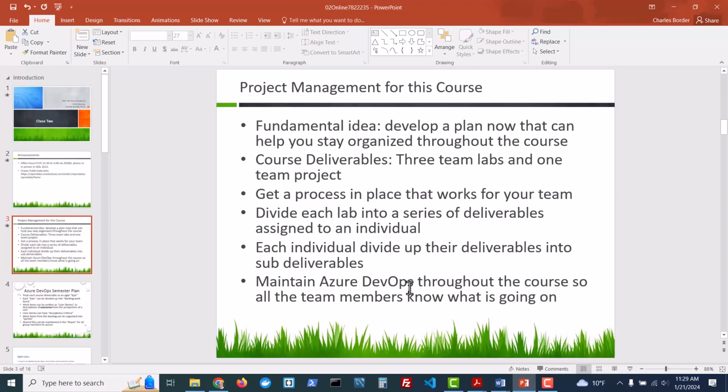If there's a dependency between the SQL and the work in Data Looker Studio, then the person who's doing the SQL needs to assign a delivery date that's early on in the 2 weeks, so that the person who's doing the Data Looker Studio can have time to do their part.